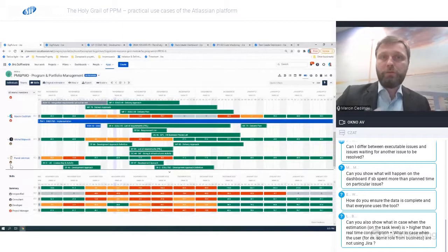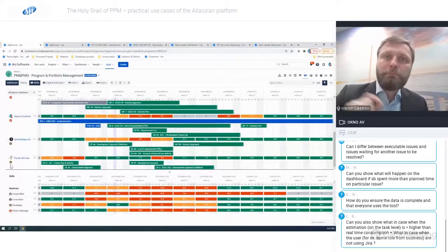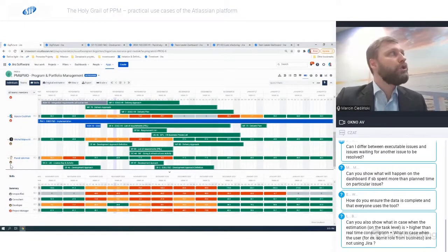So you can have people that have assigned different skills, and then from a business perspective, you're usually asking the question, okay, do I have enough developer skills or enough project manager skills available for a project that is coming on in a specific period of time, right? So the business, when they approach us, usually they're not asking about a specific project manager. If they do, okay, we can discuss, we can negotiate on a team member level, but usually we analyze the skills availability, the capacity versus demand on the skill level.